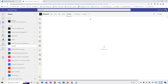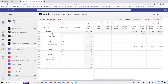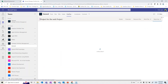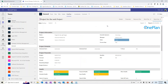On the financial side, having detailed financial plans allows you to figure out whether budgets for projects will fit within overall organizational budgets. You can define cost categories — labor and non-labor — and figure out total project costs that roll up into the mix. Status reports from all this naturally feed into the prioritization process, because as things are doing well or not, that might factor into decisions about what to continue, put on hold, or cancel.